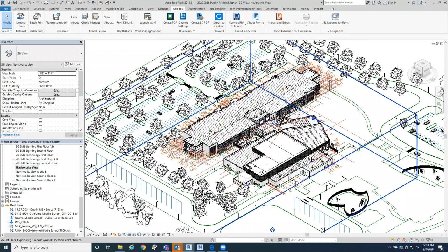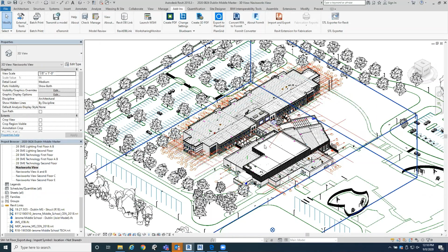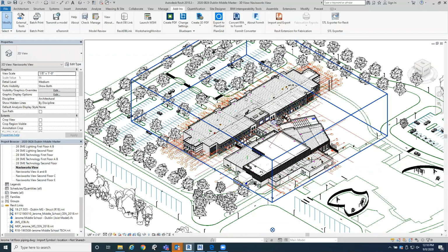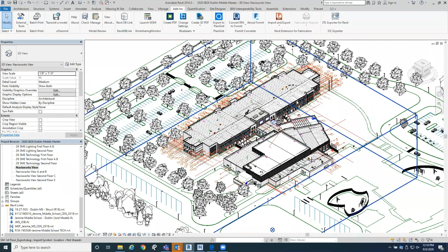We took this floor plan here and coordinated it first, and then the two-story footprint we split in half. So we were coordinating second floor, half of it, then we got the other half, then we went down to the first floor, coordinated half, then the rest of the half.